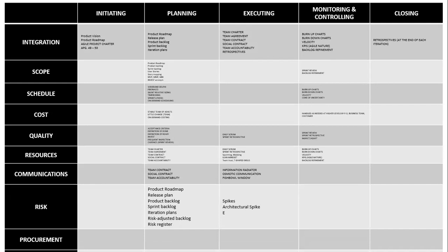You could use a concept of enablers. You also want to use the concept of the daily scrum, because the daily scrum is where we uncover impediments, but an impediment is a realized risk. So a risk is an impediment waiting to happen. So it would make sense that before stuff becomes really bad, you as a team are aware and you are escalating as needed to your Scrum Master, who should be on the ball as far as anything to do with risks, impediments, whatever you want to call them.